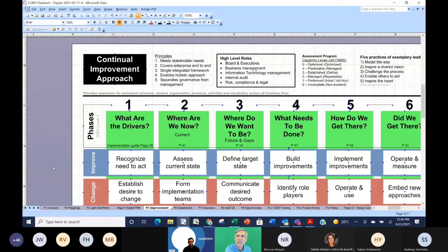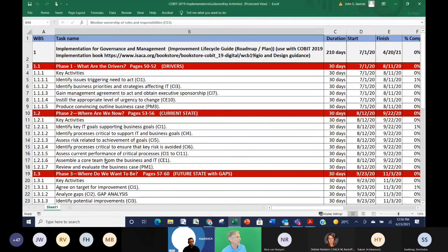And then actually this led me to create the project plan where each of the activities had a work breakdown structure identifier. So if somebody wanted to know what they were working on for the improvement, we could go back to that spreadsheet and identify in the first column A, I could say, okay, 1.1.1, have we done that? And it really helped out. We could just pick out which ones we liked, and some of them we did, and some of them we just ignored. But it really gave us a standard view, context and structure, and content for consistency.